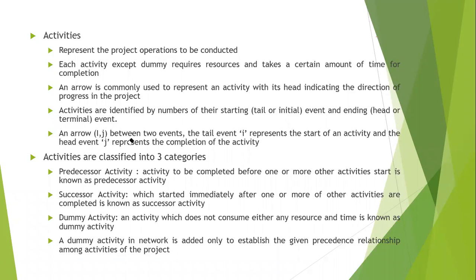That means, let's say there is one event which has to be completed. Until the previous event is complete, the next event cannot start. In the previous event, let's say two arrows join, and we don't know which is first and which is second. So we will create a dummy telling that okay, do this first, then the dummy comes, and do this next.